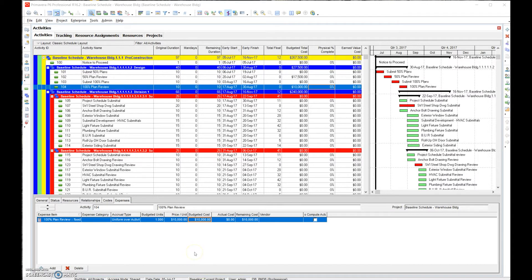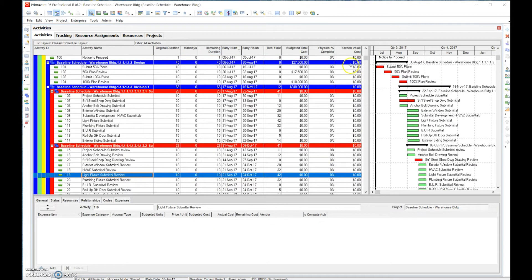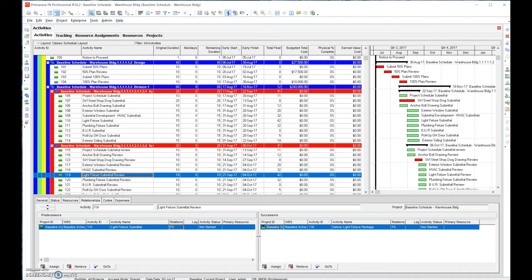Looking at this project, we can see we have excess float of 42 days, which is quite long. The first thing we have to ask ourselves is: is it missing a relationship? Is the network not closed? The activity has both a predecessor and successor, so it's not an open network — but is there perhaps a successor that needs to occur closer to this activity?